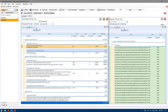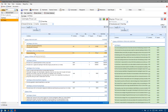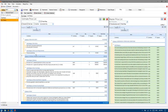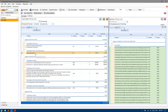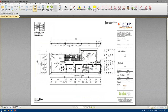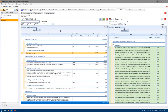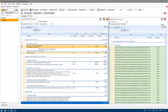Once again, we've got no knowledge around temporary fencing requirements or earthworks, but by maintaining those items in there they're a trigger should further information come to light after the fact. That's why these items are sitting in the standards with zero value — when you do copy it over and you do have a site plan, it's a trigger that you need to put those values in or make allowance for those, because they were consistently getting overlooked. Right-click and mark complete.